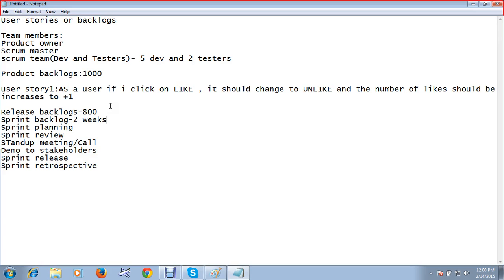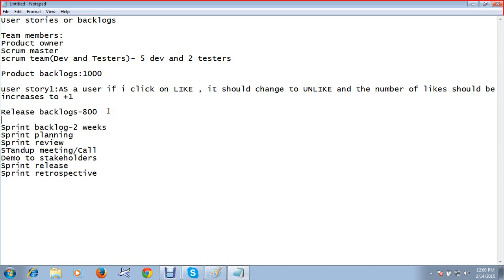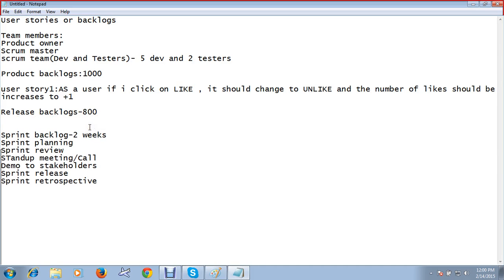Your Agile sprint should be very, very small and flexible for all the developers and testers. Basically, what is a sprint? Nothing but a duration, a time period. That's it. A sprint is nothing but a duration. Now, in these 2 weeks, I want to get user stories to work on. Now, who is going to take those? A Scrum Master is going to take a number of user stories, based upon your team size, into the sprint backlog.